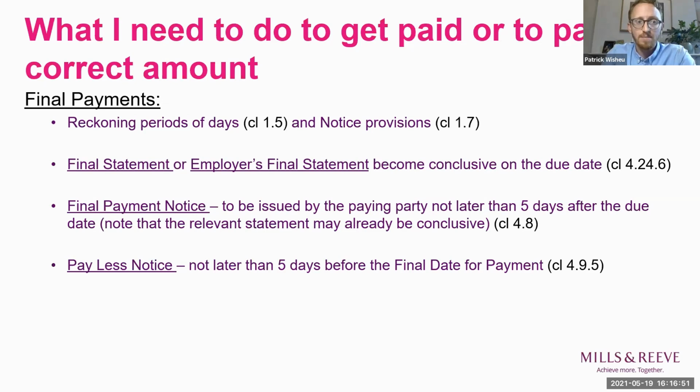So the next step is the payment notice, which responds to the final statement or the employer's final statement. But it's slightly different because it's not always the employer who's giving it; it's the paying party that needs to give it. And it needs to be given not later than 5 days after the due date. And this needs to be given, as I've said, irrespective of the fact that you think there might be an error in there. So you need to point out that error in this as well.